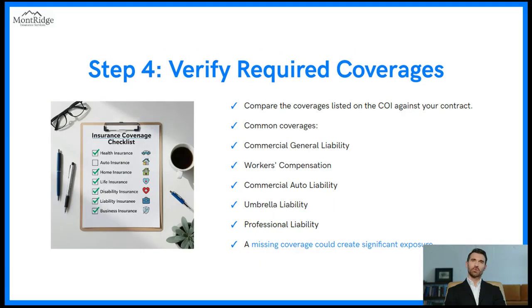Step 4. Verify required coverages. Compare the coverages listed on the COI against your contract. Common coverages: commercial general liability, workers' compensation, commercial auto liability, umbrella liability, professional liability. A missing coverage could create significant exposure.